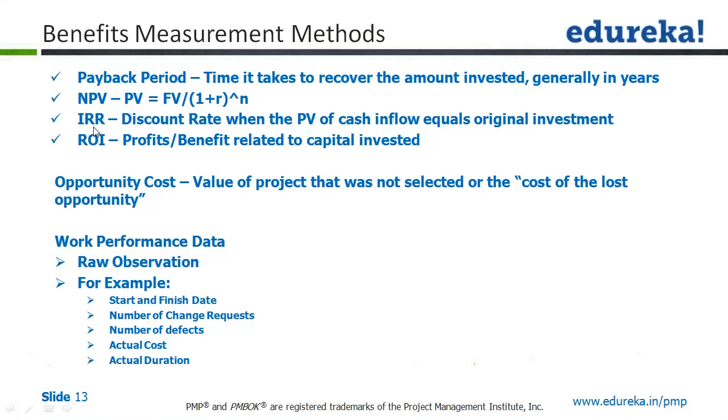Project B is going to give you an IRR of 7%. Which is the project you will choose? So the higher the IRR, that is where you need to prefer. So your answer would be a project with the higher IRR. That means between 5 and 7%, if project B has 7% IRR, that's the project to be selected.